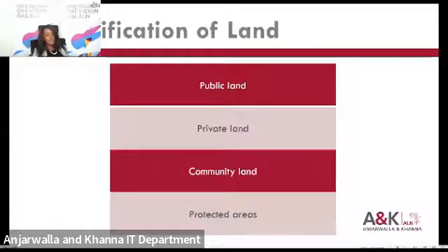If the community land is to be converted into private land, then that process has to be done in consultation with the community. And I understand that 2/3 of the adult members of that community must consent to the conversion of that land. Otherwise, the conversion and the use of that land for any other purpose could be contested in future.